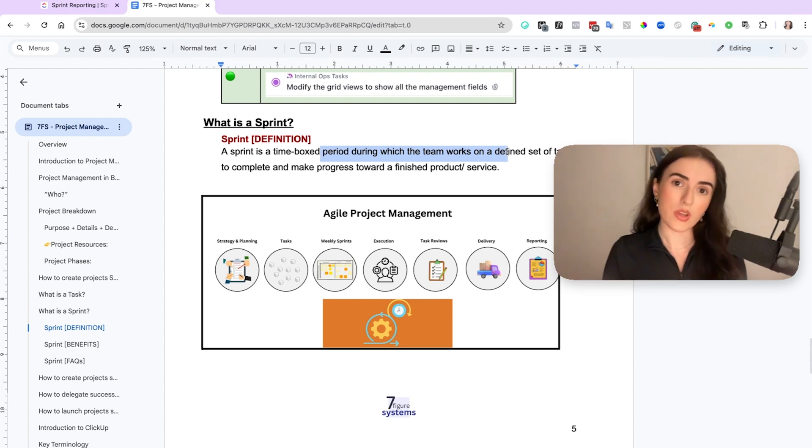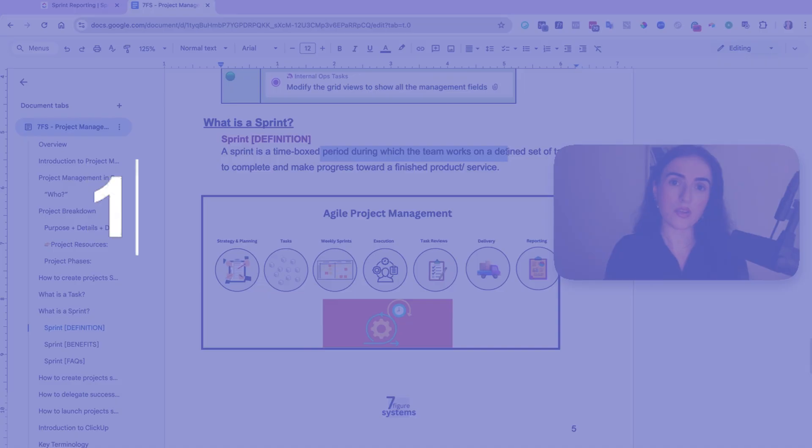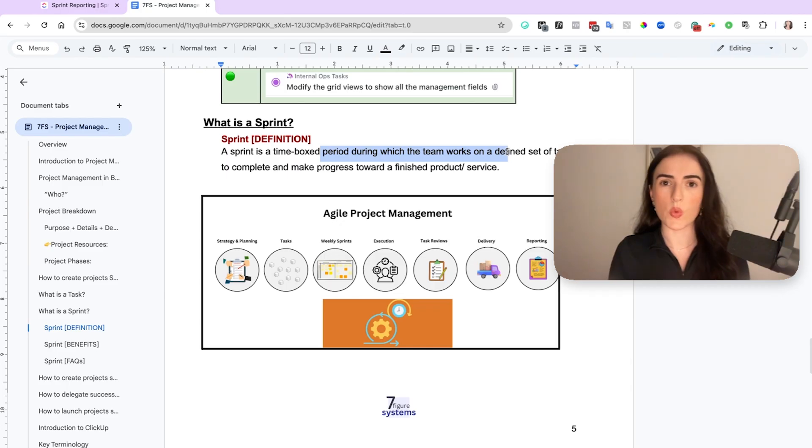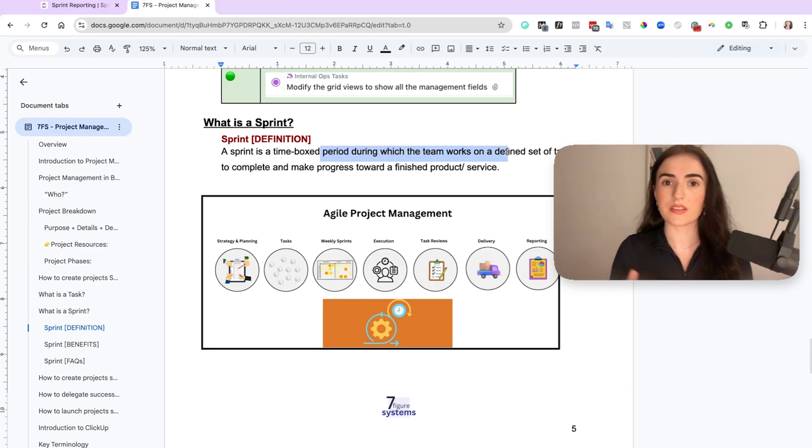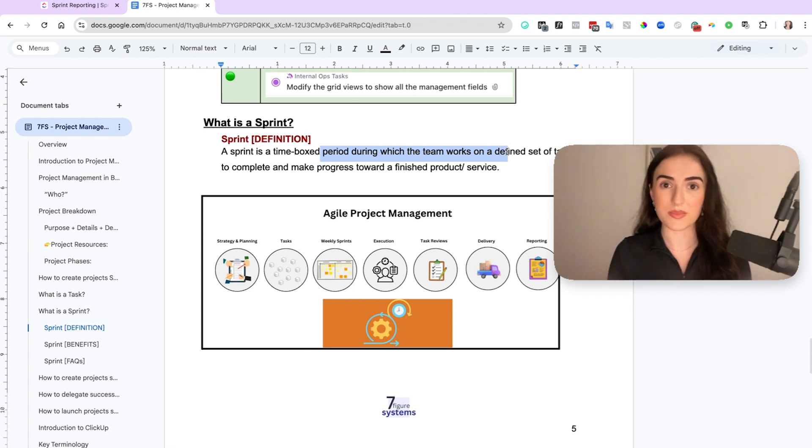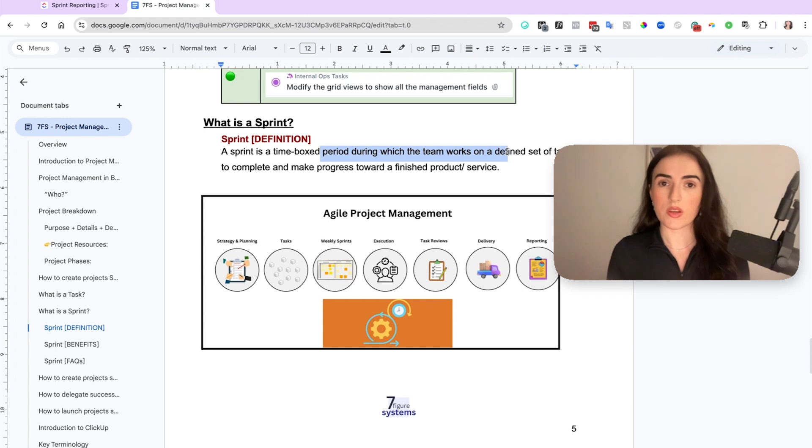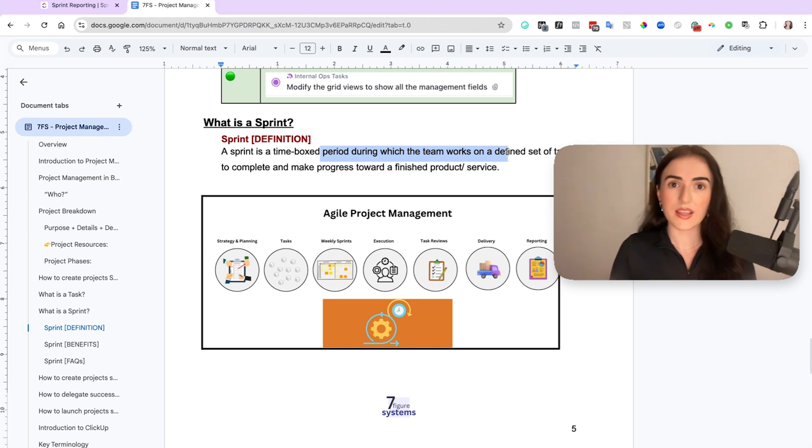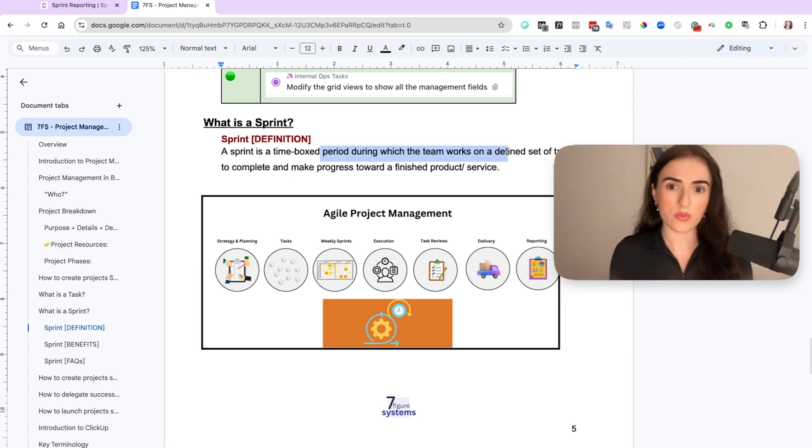For your agency I recommend having one week sprints. When you have two weeks it's way too long and it is easy for things to get lost or tasks to be delayed. So I highly recommend that you stay on top of your tasks by having one week sprints. And within this one week you get your team to complete 50 tasks or 100 tasks and it is only that that they need to focus on.